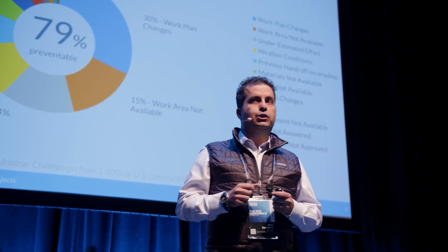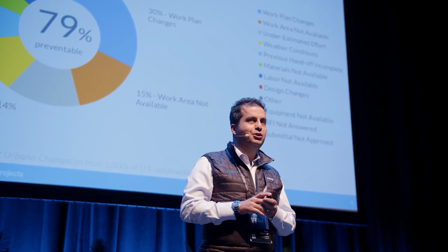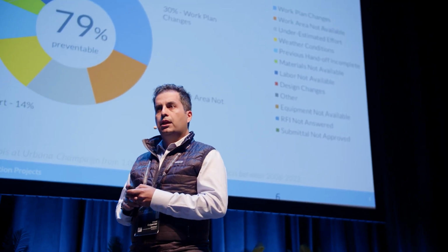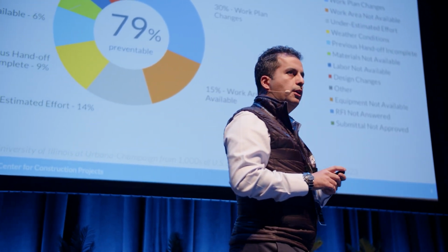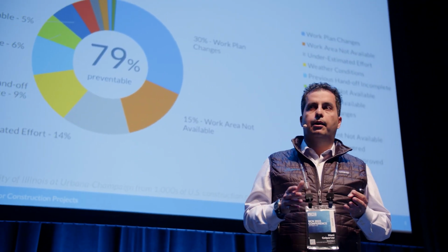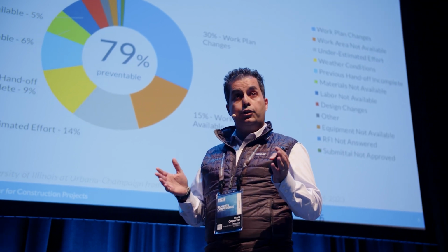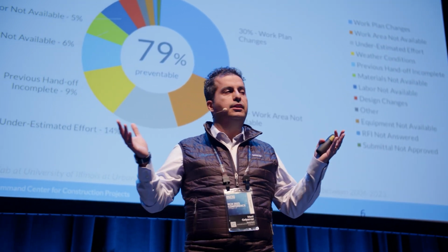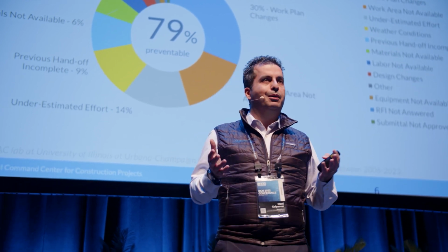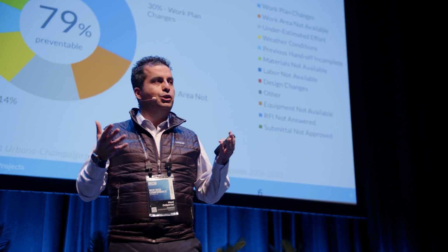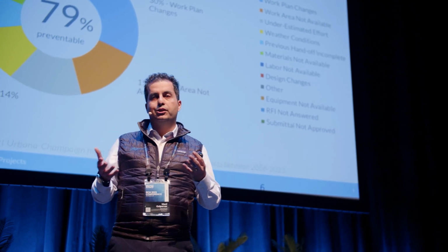Not only are we not really good at putting together plans, we're also not really good at executing plans. Over the past 15 years, we've been surveying superintendents on some of the barriers that are preventing them from executing their tasks day to day and week to week. And there are all kinds of reasons. Sometimes you show up and work plans have changed. Sometimes you show up and the work area is already occupied by a different contractor. You underestimate the effort that goes into the execution of a project.